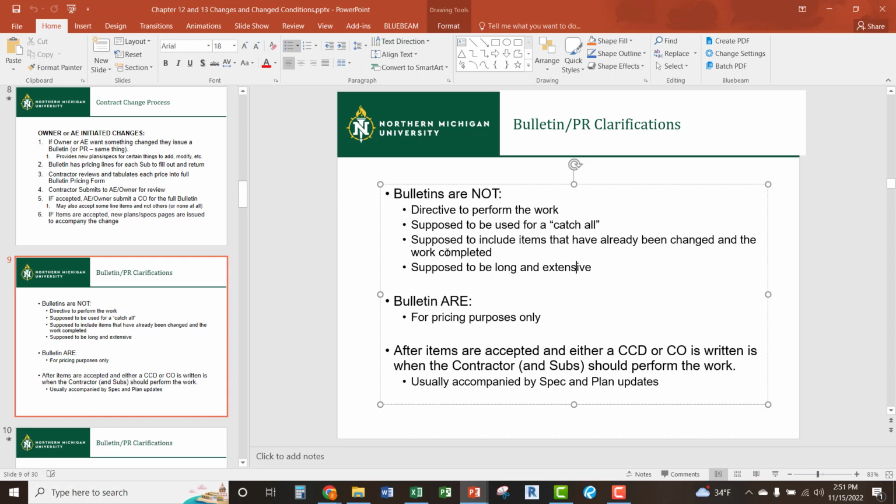or bigger items that were coming from alternates that we already knew about. So then they try to do that as a catch-all just so you can issue one giant set of documents instead of doing multiple small iterations of document updates. I have a major problem with that because managing that is extremely complicated and cumbersome. Subcontractors get confused. They start building the wrong things because they're not sure which drawings we're working from anymore. So make sure that pre-construction is extremely important for these kinds of things.